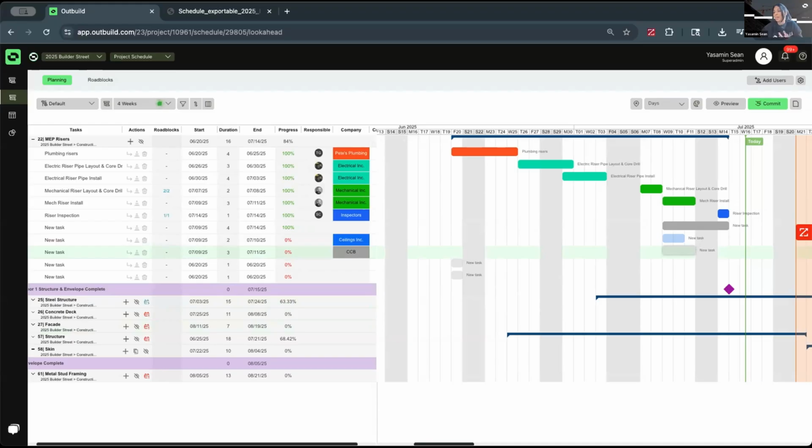So again, calling out the simplicity: clicking a plus sign, assigning the right contractor and crew, which is coming from your directory in Procore, and then fitting it within that sequence of work. And then as I'm walking the job and my task is 100% complete, I can update this number, which is updating your schedule percentage in real time. So it's eliminating that manual process of sitting down and going over our updates.